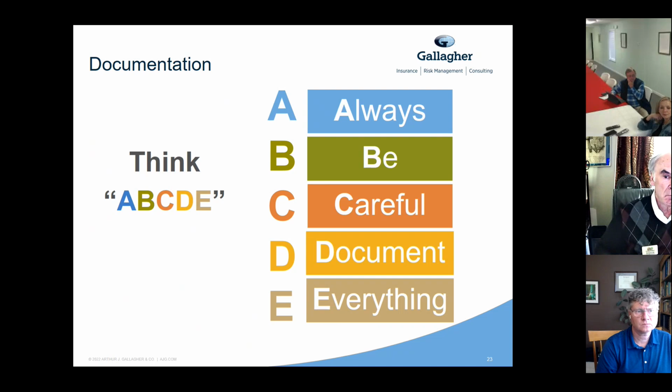Document your communications with the contractor, document your contracts with them. If there are any issues that you see during construction, let's say you're auditing one of their safety plans and it's not up to date, make sure that you have that all in writing with them, that you're documenting everything. It is so vitally important if a loss arises to have documentation so you can easily tender claims, so you can transfer risks, so that you make sure that the at-fault party is taking responsibility. Having solid documentation is going to be the best tool for your claim adjusters and for your defense attorneys, to make sure that you'll be in a defensible position if a claim is made, but also if you need to transfer risk, that you're in a position to be able to do so.